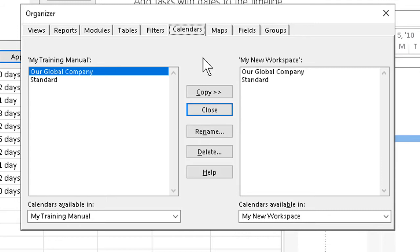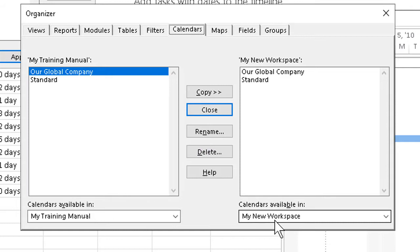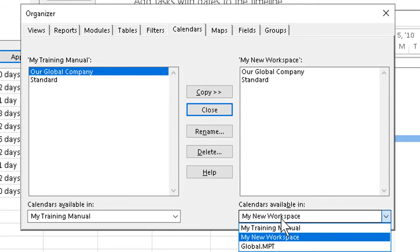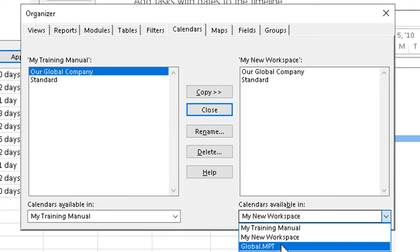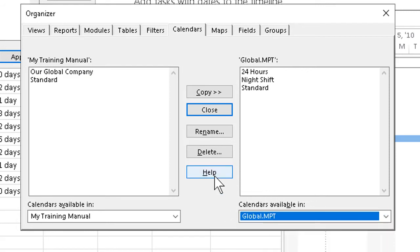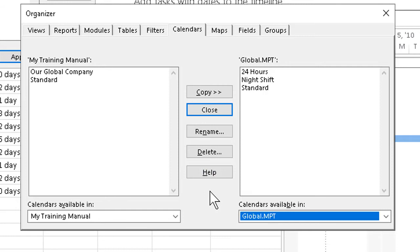And that's not all. If we copy a calendar from any file to the document called global.mpt, which we can get to from the drop-down list here—the global Microsoft Project template—we can select that, copy, and make a calendar or a field map or a view available anytime we start a blank new project.